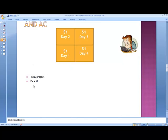Now earned value is different. EV, earned value is different. Earned value, in order to get earned value, you are going to have to have done some work. Work has to have started. Otherwise, earned value is going to be zero. You're not going to have gotten anything done.